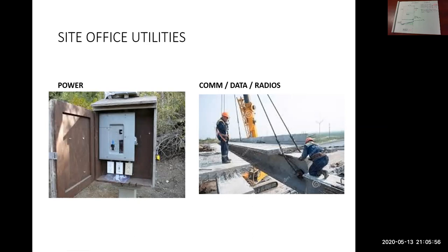Having your employees use their own personal cell phones for company business on a daily basis. Typically, employees do not like to do that, so they need to be compensated somehow. So that compensation should be included in your estimate. So cost of cell phones.